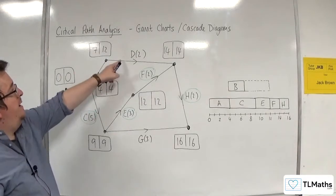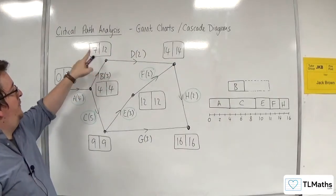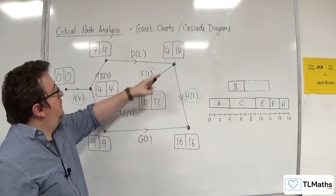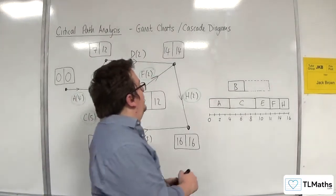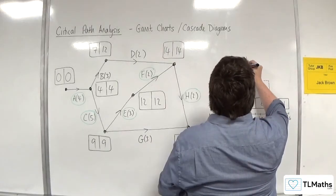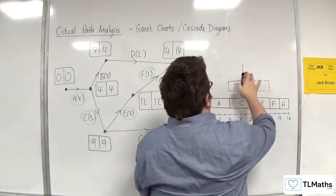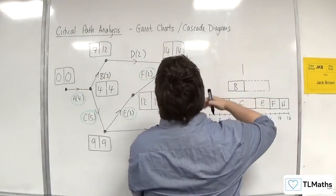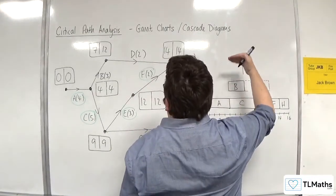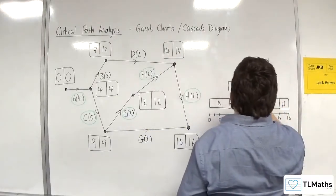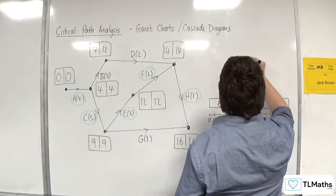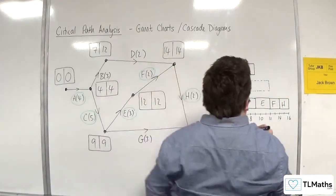Now, D can start at 7 - that's the earliest time it can start - and it can go up to 14. It lasts 2 hours. So we go to 7, and we need to go on to a new bit here, a new line. So leave a gap. For each other activity that's not critical, you need to go on to a new line. So 2 hours. There's D, and it can go up to 14.